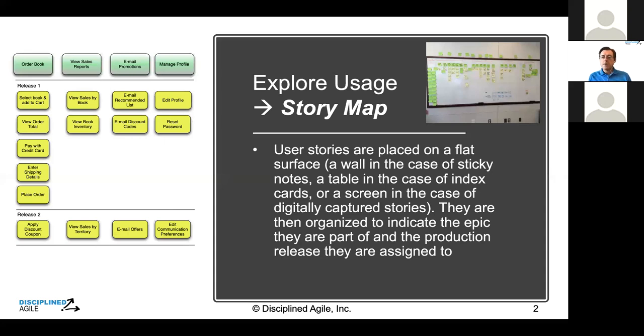And so what I asked them to do is, how can we build some of the stories to try out those different technologies, therefore mitigating the risk as early as possible? So what they did is they took a purple sticky and they put it on the yellow ones to indicate, by implementing these stories, we'll knock off a half dozen technically tricky challenges by proving that we can actually make this thing work. And again, back to dad, that's our journey towards a milestone we call proven architecture.